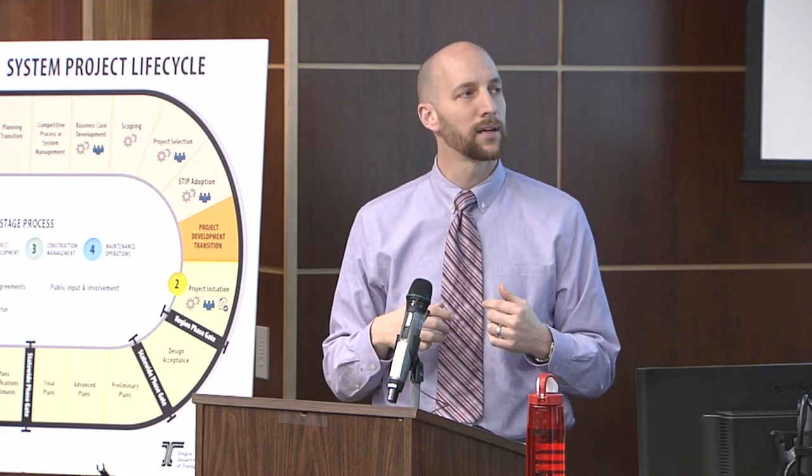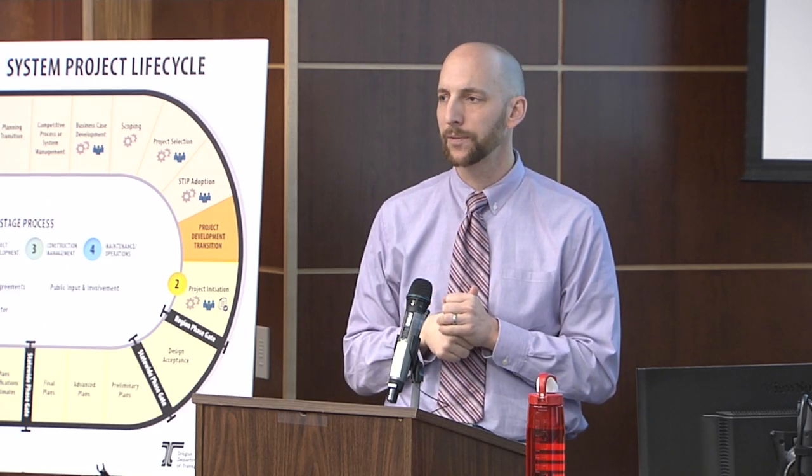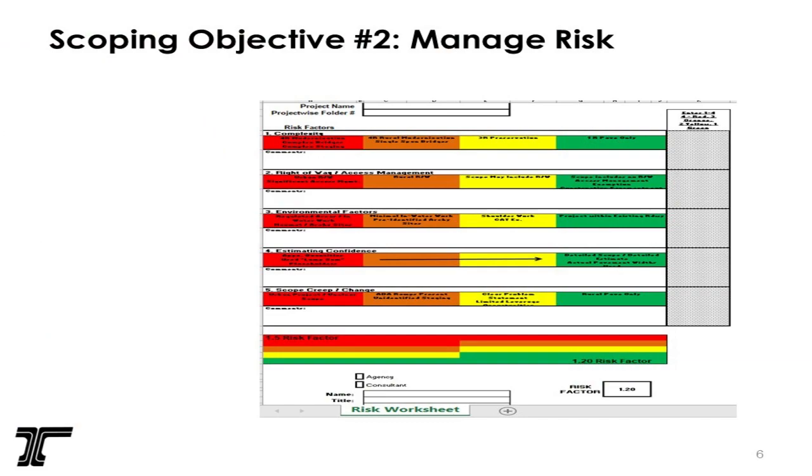In this cycle, a team that was going through the Transportation Leadership Institute developed a tool. I just call it the TLI risk calculator. I don't know what its real name is. But it's a pretty simple spreadsheet tool that lets you ask yourself across 5 measures how much risk you're carrying. What it does is it spits out a contingency rate between 20 and 50%.